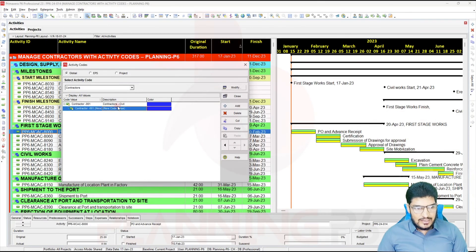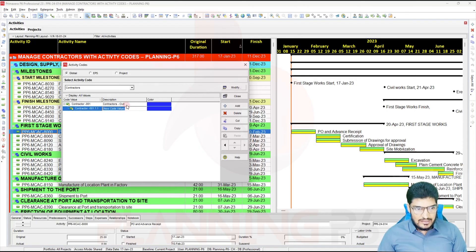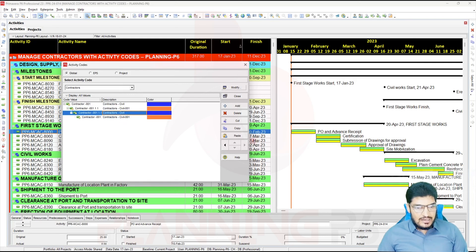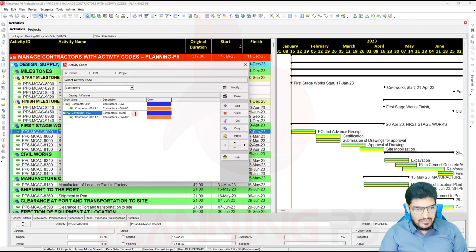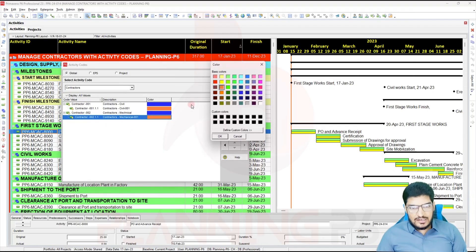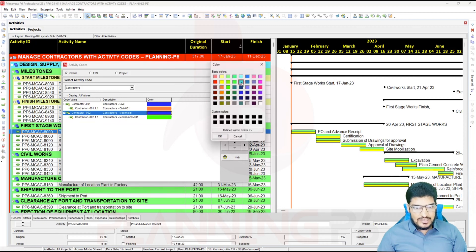I will write here 'Contractors for Civil,' then add under that. I will move it under 'Contractor Civil,' then write here '1.1 Contractor 1.1.' Then I will copy and paste and write '001.' I can give any color for grouping and sorting purposes. I will copy and paste again and move back to that section — this is main contractor '002.' Then I will write 'Mechanical' — or erection, whatever you want — 'Mechanical 1.1,' and 'Mechanical-001.' These are now our mechanical contractor entries. I will assign colors to them as well.